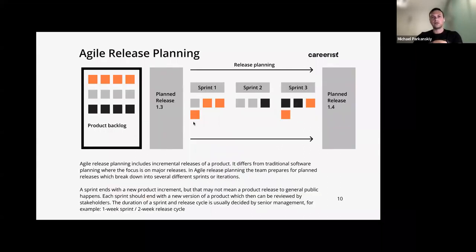So in the first sprint, in the first 2 weeks, we as a team decided that we're going to build this new feature where we are able to post an image to Instagram, as an example. And we started building it. And we got down to 2 weeks. At the end of 2 weeks, developers were able to build it, but QA didn't get the chance to test it. So we're going to have a retrospective, and we're going to have a conversation and say, okay, what did we get done for the last 2 weeks? Okay, we were able to build it, but did QA get to it? No, QA didn't get to it. We didn't have enough time. We're going to need to move it over to sprint 2.